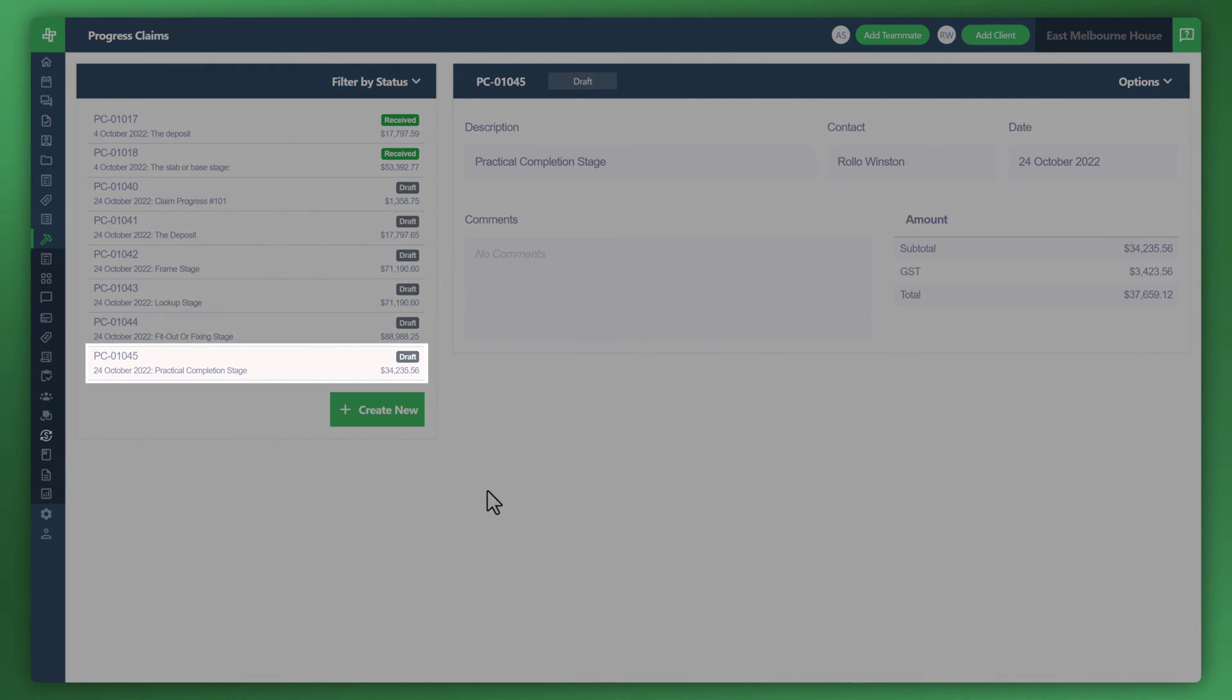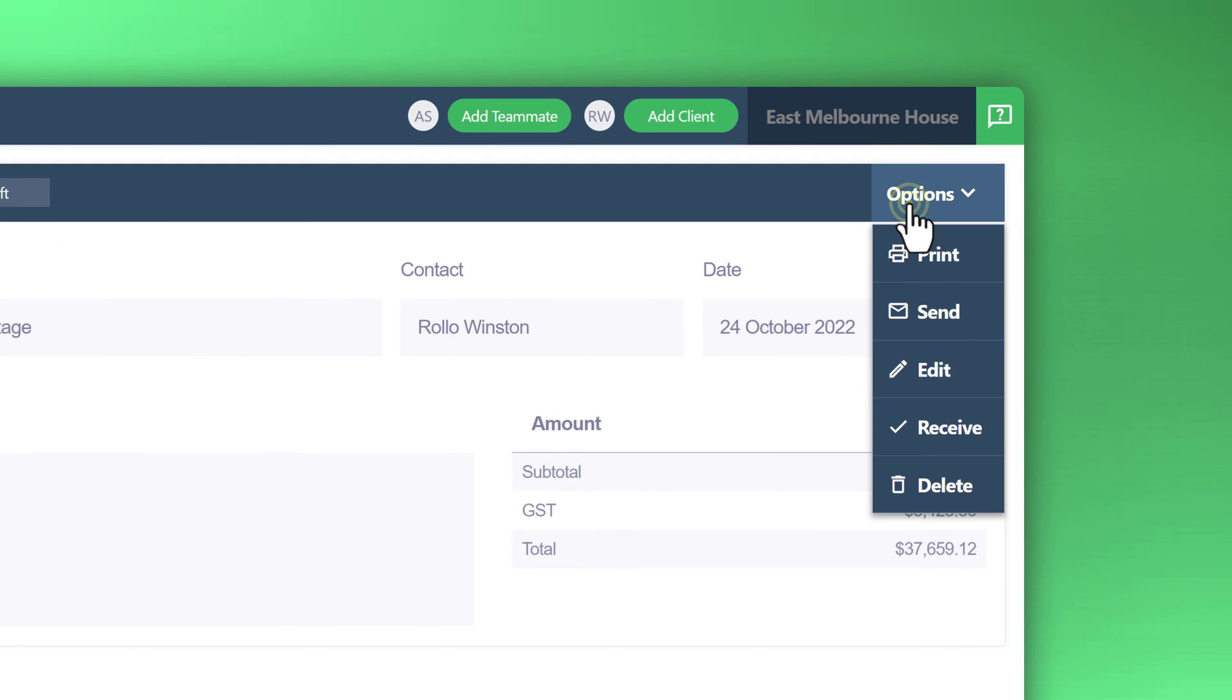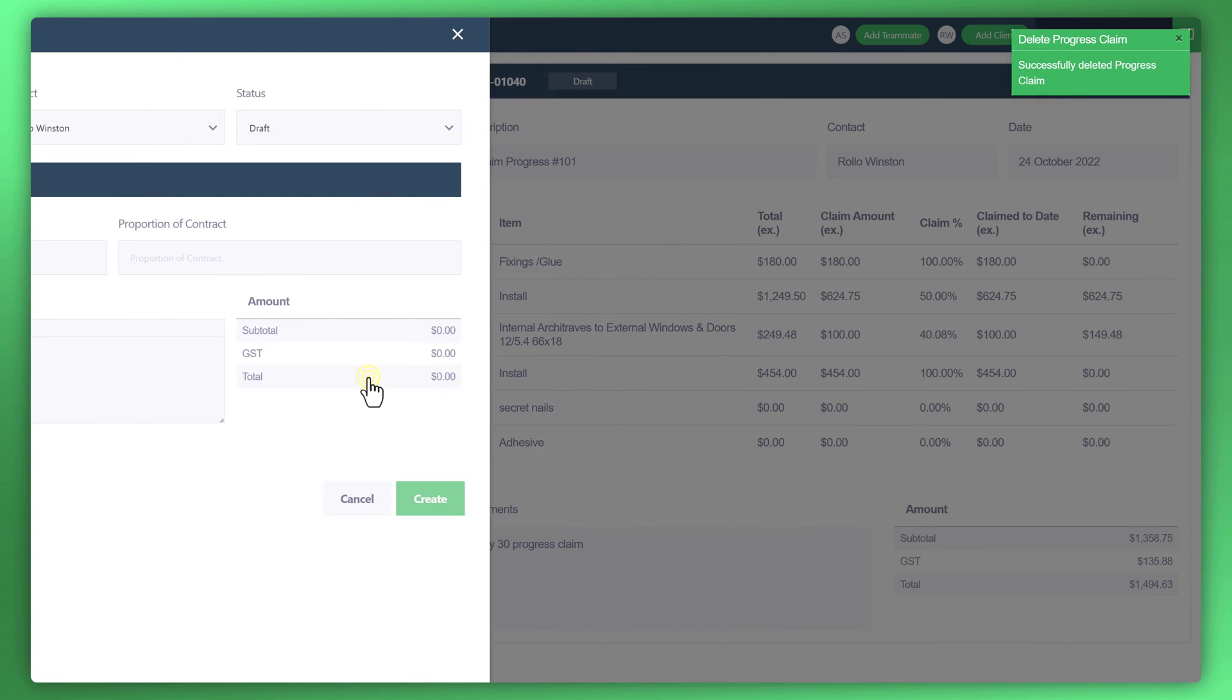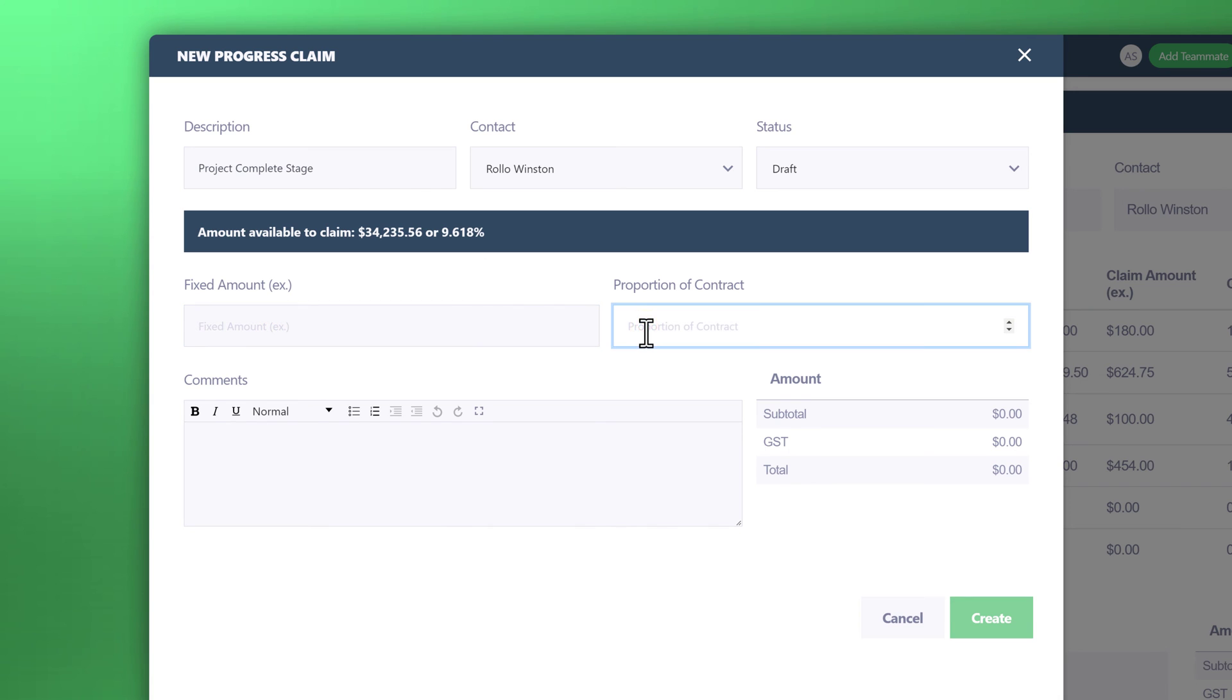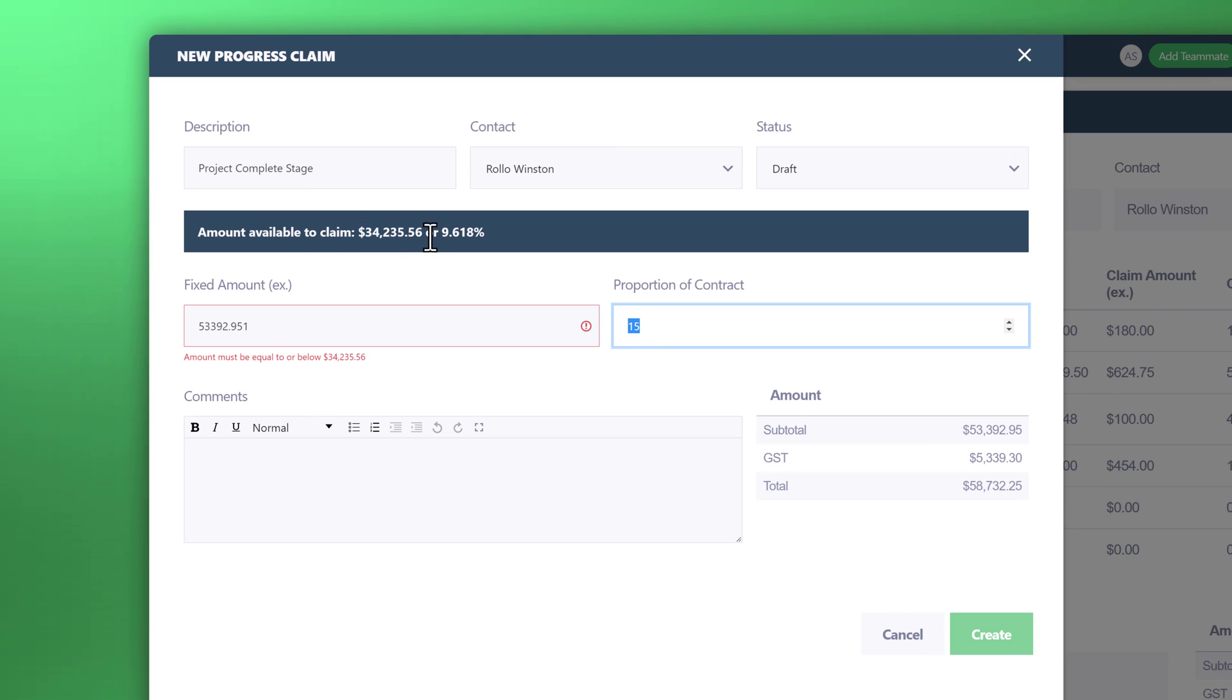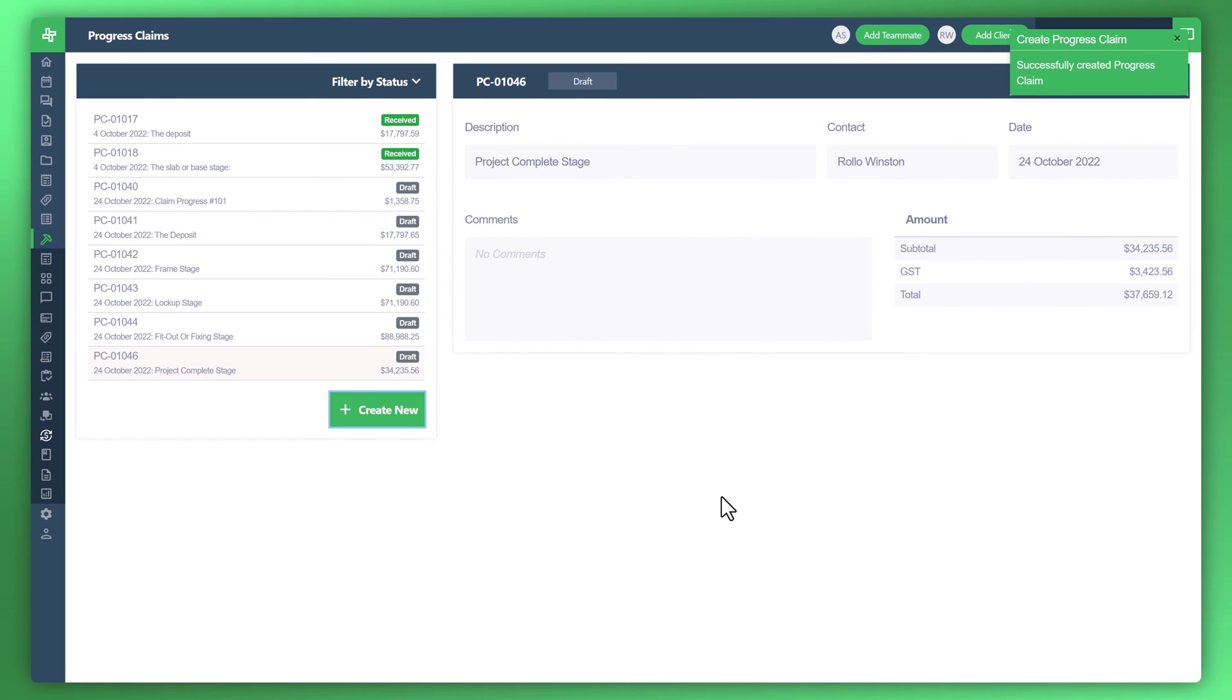Let's have a look at that again. Let's delete this so I can show you how to edit that. Go to options and you can now delete that. Let's recreate that. Now if I was to claim back 15%, we'll notice that amount must be equal to or below that particular amount to claim. In other words it won't let you. You get that error message if you've claimed too much above the actual available amount left on this contract. Let's claim the exact amount. That works now. Click on create. Now we've basically balanced out the contract value against the progress claims.